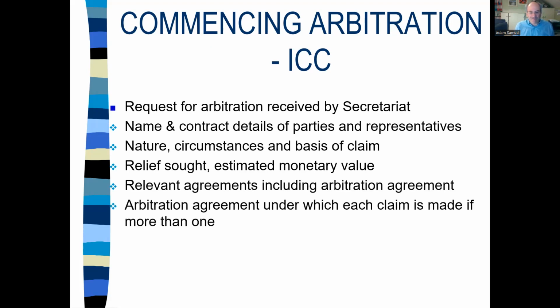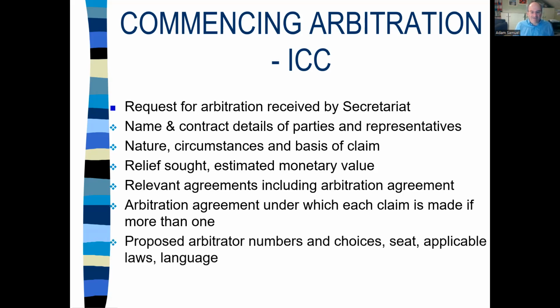Any agreements, if you've got claims under different arbitration agreements, they should all be supplied properly and clearly. Other than that, suggestions as to arbitrators, how many there should be, who might be appointed, seat of arbitration, applicable law and language, all have to be there. And you can throw in anything else that you think might help, but please don't try to argue your case in your request for arbitration.